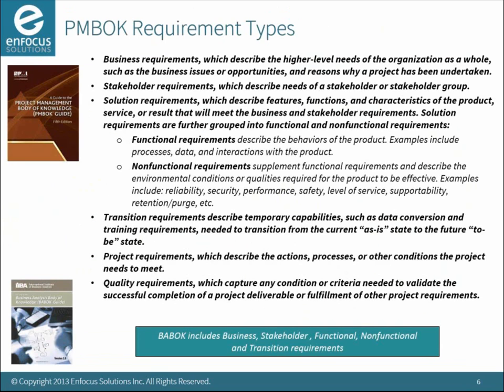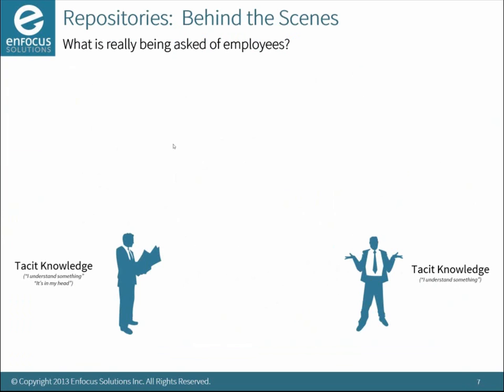What do I need? And when you go to the requirements types, it gets even more abstract. You've got these different requirement types now, PMBOK coming forward with its own requirement types, and IIBA coming forward, but you have to say there are different types of information that you need to manage on the way through. Look at this list: business requirements, stakeholder requirements, solution requirements, different types of solution, functional, non-functional, transition requirements. How are you going to do this on paper, right? And as Jason rightly points out, change control is the biggest issue on this. As you step forward, you've got changing business requirements which cascade to stakeholder, which cascade to solution, which, by the way, all end up in transition. The problem just compounds on itself.